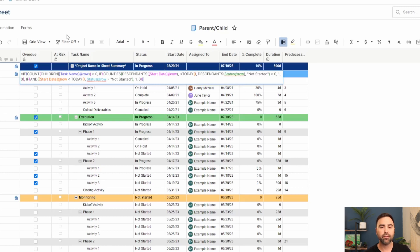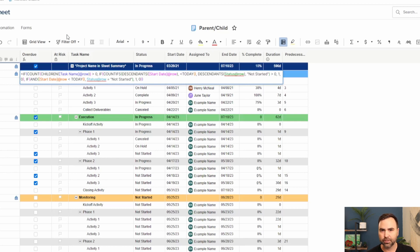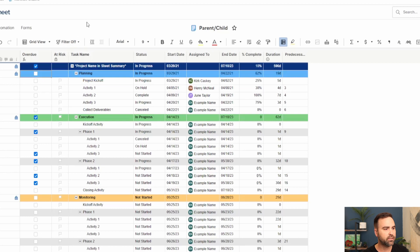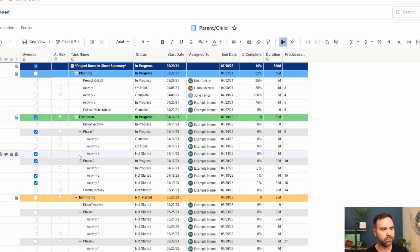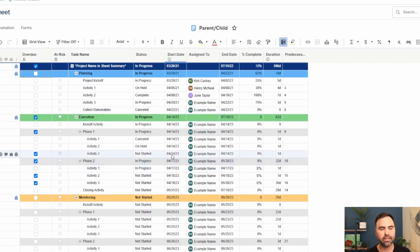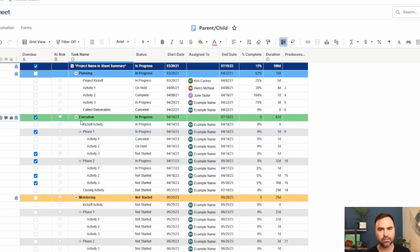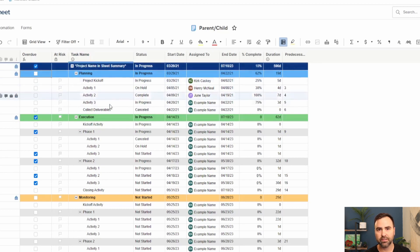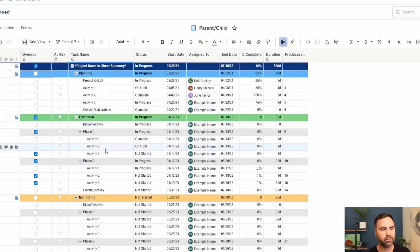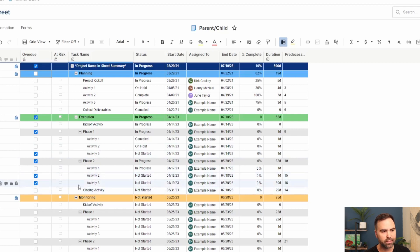If we're not on a parent row, in other words, if we're on a child row, then it's also going to do those same two checks and check those boxes as well. So what you see here is while this child is checked on because it's not started and it's in the past, it also checks on its phase. It also checks on this section and it also checks on the highest level project as well because these are all in the same hierarchy. And then we have the same whole tree down here at the bottom.